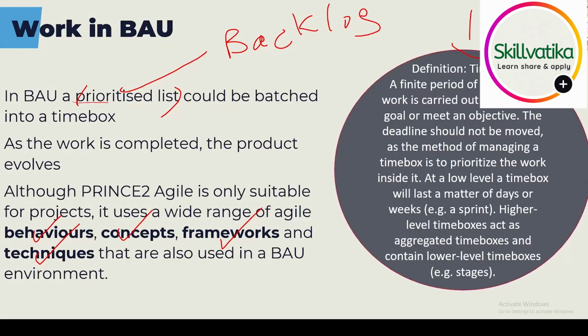Yeah? This is important for project managers to understand, because when a project manager is too output focused, they lose sight of the targets. If you are told that you've only got these two windows to operate within, time and cost, then your responsibility is to ensure that the solution you deliver is fit for purpose within that window. And if you know that you cannot deliver a solution within the windows designated, then you should walk away from that project. So if I said to you, you've got a week to secure my house, and I show you what I mean by secure my house, you might come back to me and say, Sydney, I'm sorry, but we can't do that. There is no way we can do what you're asking us to do within a week. And I might say, well, sorry, I got someone else who can. Yeah. So there are projects that we should walk away from. It's important to understand this.